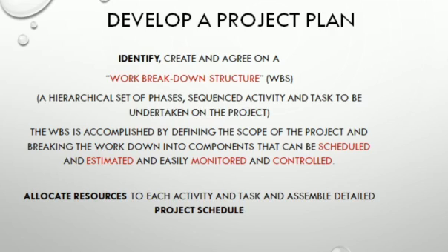So that's what the work breakdown structure says: it is a hierarchical set of phases, sequenced, and tasks to be undertaken on the project, breaking down the work into different phases in a sequence of achieving the task in that project. As I said, the WBS is accomplished by defining the scope of the project and breaking the work down into components that can be scheduled and estimated and easily monitored. When you're breaking the job down, it becomes easy for you to get the estimate as well as easily monitor each phase of the project.